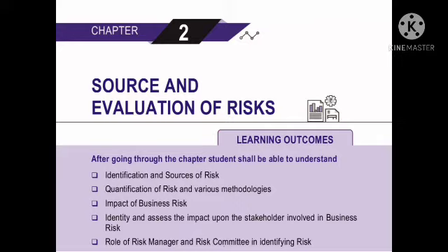10. Incident analysis. Incident analysis relates to risks that have recently occurred. Recording incidents in a register, conducting root cause analysis, and periodically running some trend analysis reports to analyze incidents can potentially enable new risks to be identified. In addition, a high frequency of like incidents can be a lead risk indicator to a potentially larger problem.